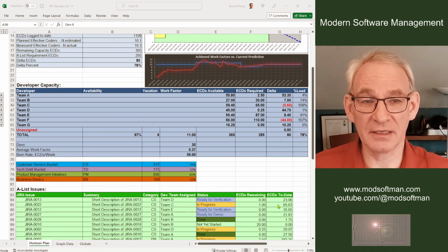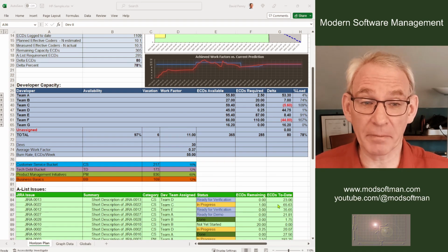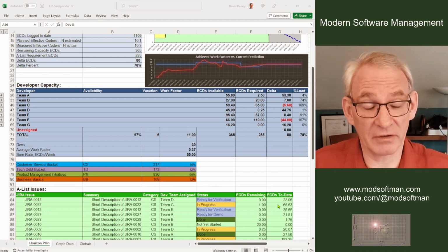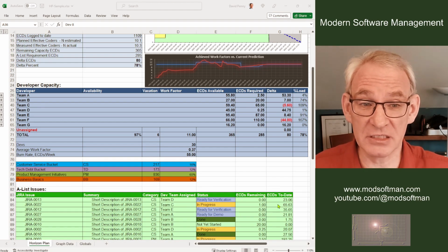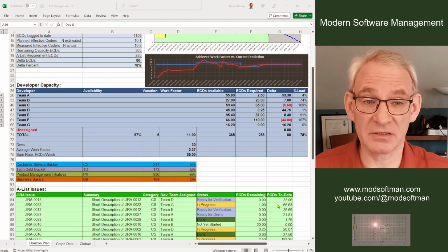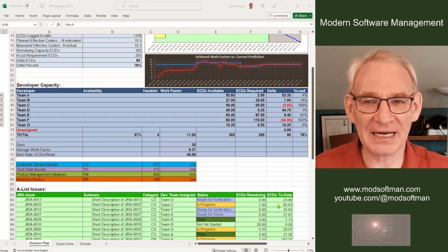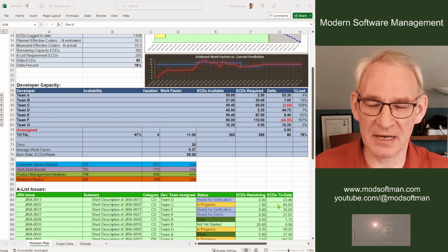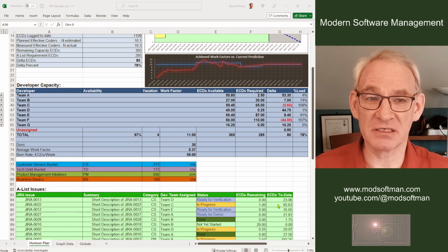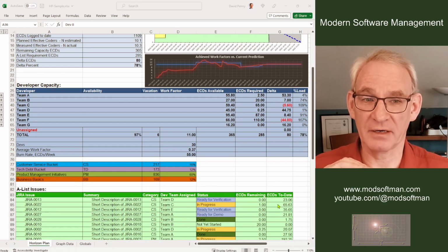We estimate the amount of time it takes to do a feature properly. So to do all the necessary tests, to refactor what needs to be refactored, those are by default what the estimates look like. Do we compromise that sometimes if we're really tight and we need to squeeze something in? Yes, that's the exception. That's not the rule. The rule is estimate what it takes to do a proper engineering job on the thing and then do that.